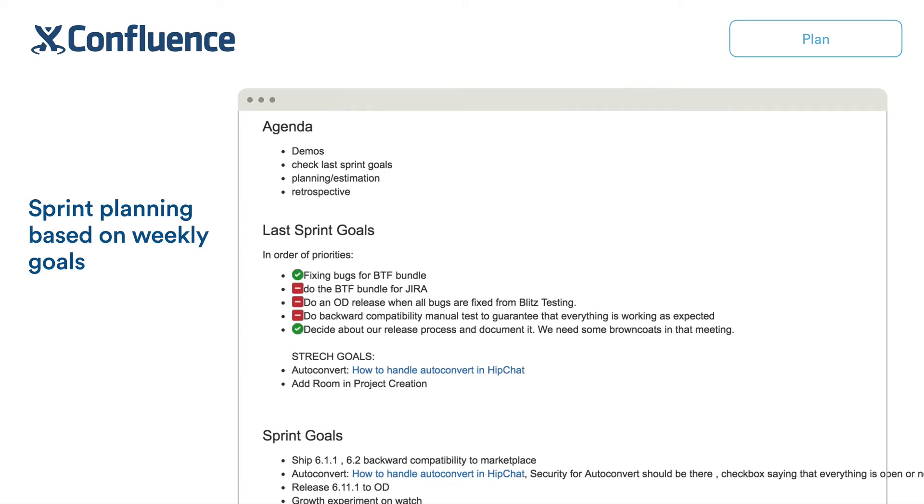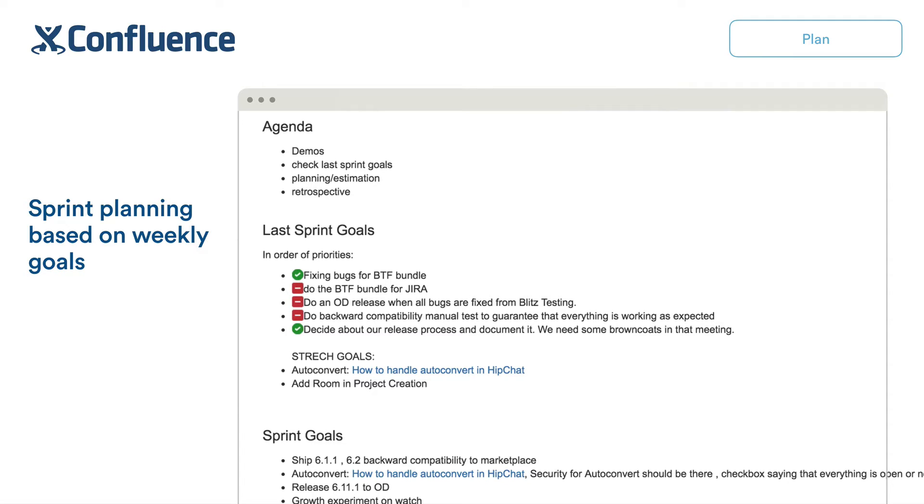Once a week, we meet for about an hour as a full team. And we go through first a demo of what was built the previous week. Second is a review of the objectives that we decided on the last sprint and whether we achieved them or not. And third is define objectives for the next sprint. So when I say objectives, it's not individual tickets. It's basically units of work which have to be demoable in some way, shape or form at the end of the sprint. It could be things like we want to have this feature shipped into production or we want to have this feature ready to review by the rest of the team.